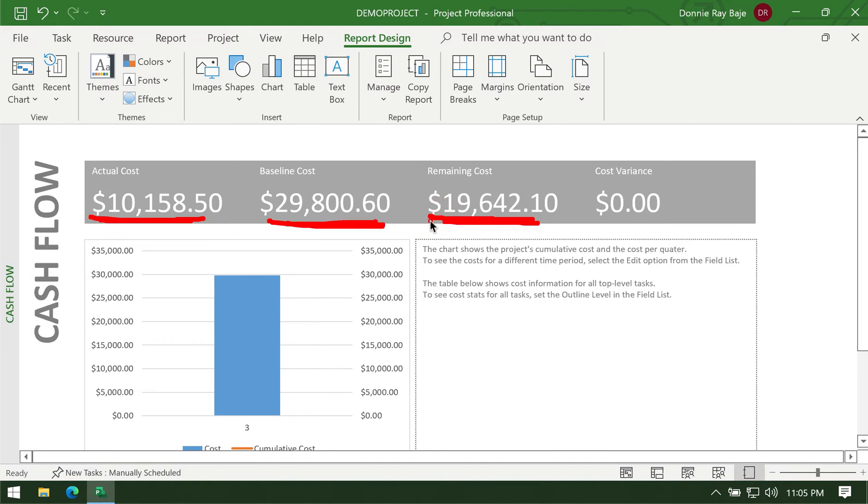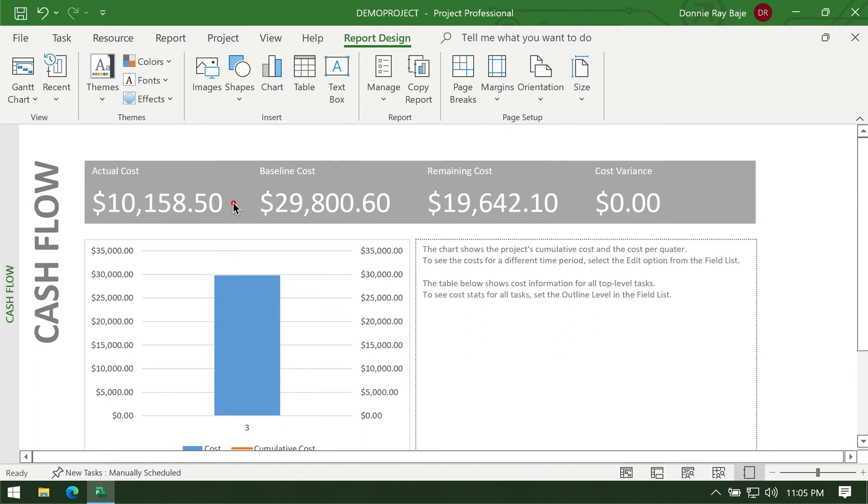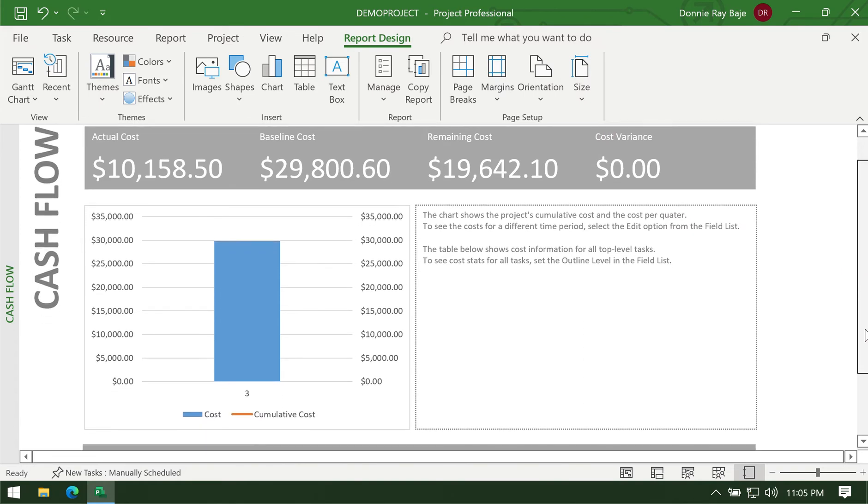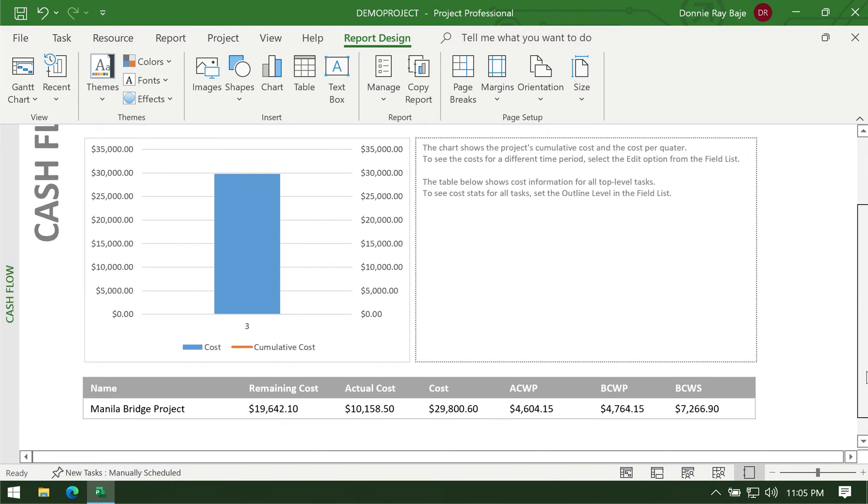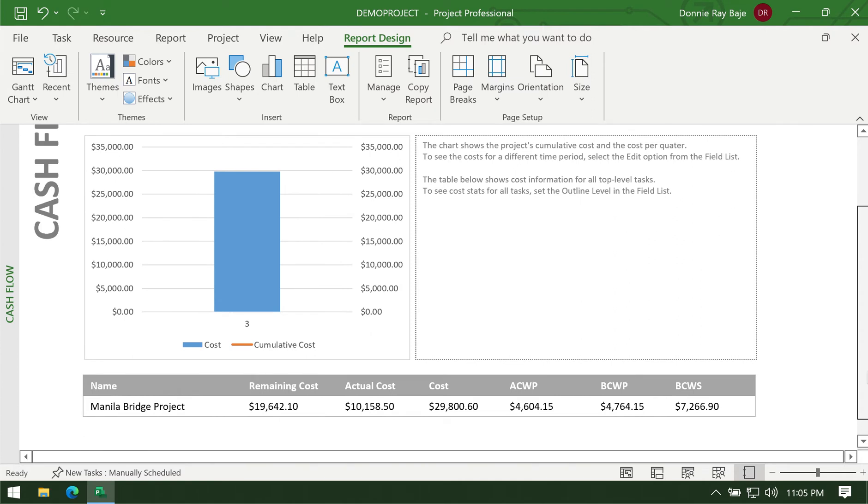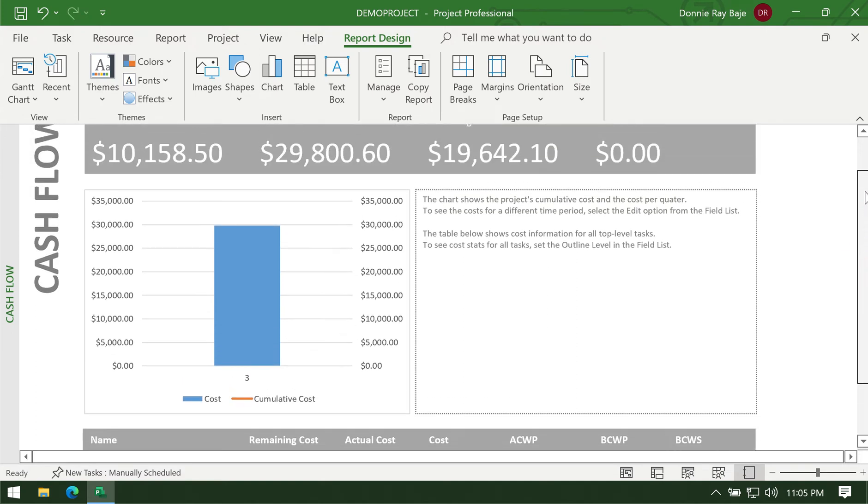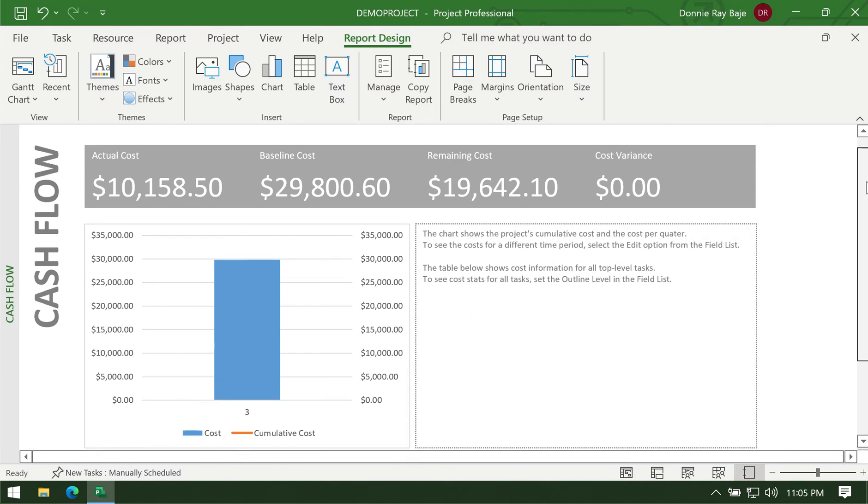Then we have a calculation of how much is still remaining for that project. If ever your actual cost becomes higher than your baseline cost, that's where or that's when the cost variance will start showing up a number. The variance here pertains to how far your actual cost is from the baseline. And then we have a very simple bar chart here, and a simple table where we have an overview of the project and the same details as what we have here in the overview part.